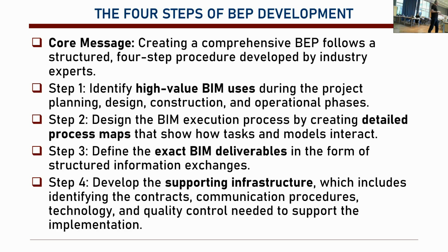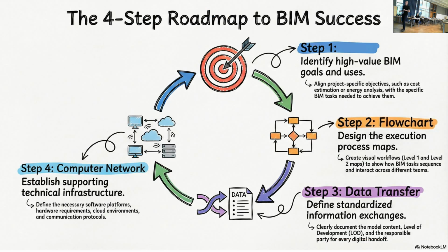And then another thing that we will say is what kind of quality control we need for the models. Like the architect will submit the model, but someone should check if it includes, for instance, highly detailed parts when it doesn't need. Okay, so then they will respond to that. Well, you're not doing right. Okay, etc. So yeah, high value goals.